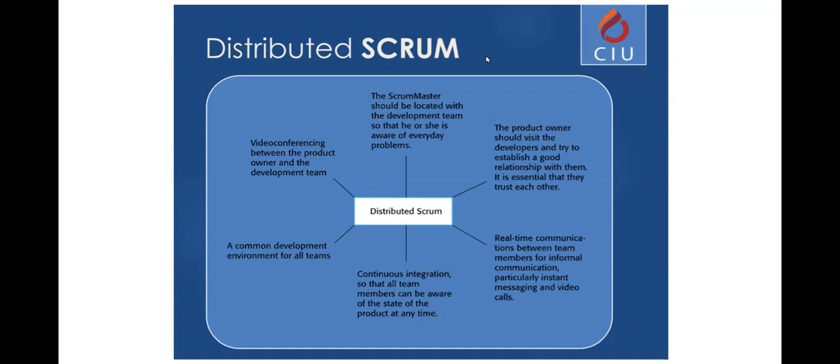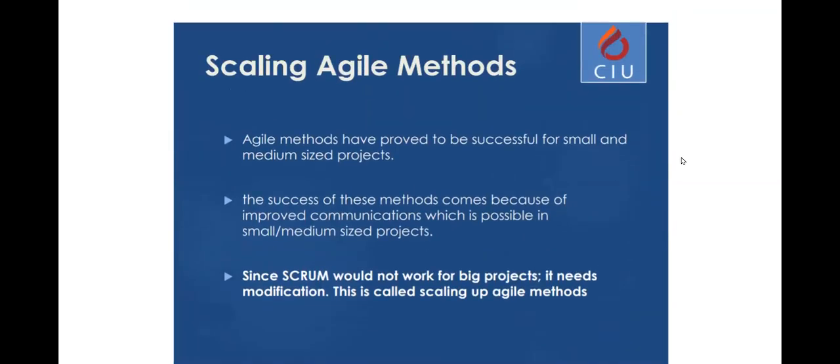At the same time, another sprint is going in Canada working on the persistency part to get some JSON data from the users. But at the end of the day, when those sprints are completed, they will be combined and the product will be released for the next version. So this is called distributed Scrum.